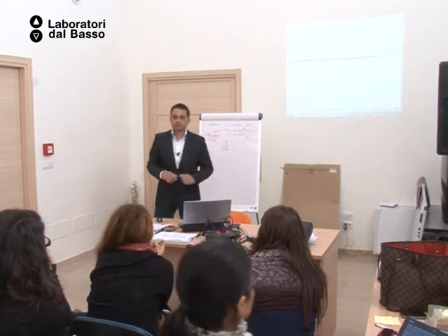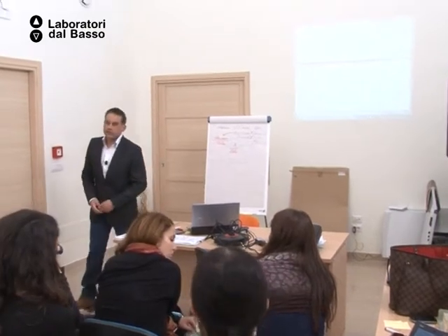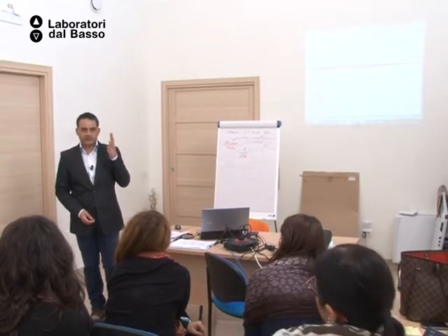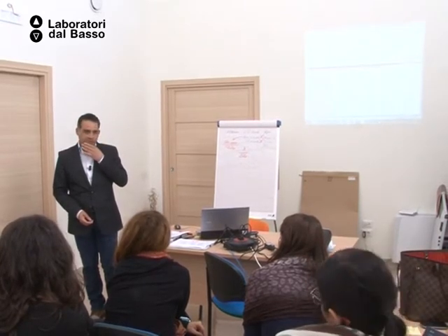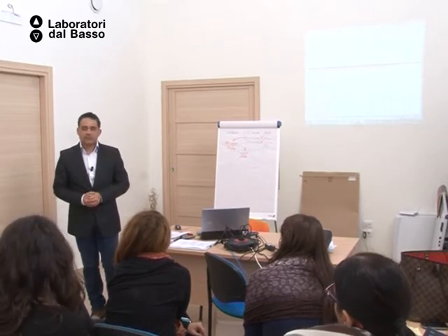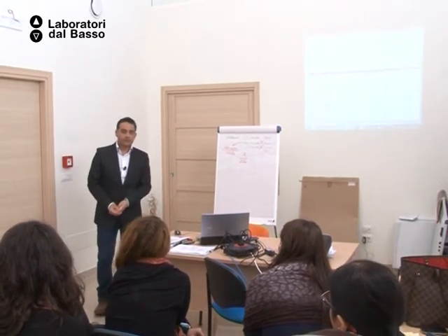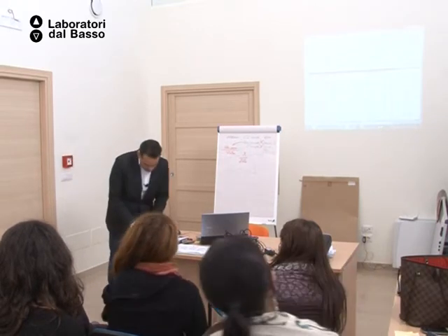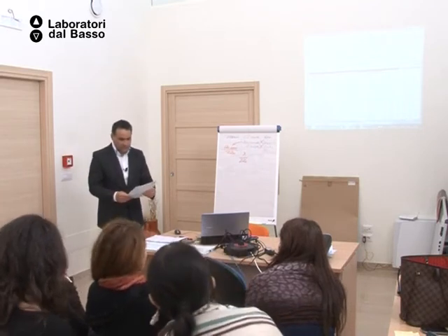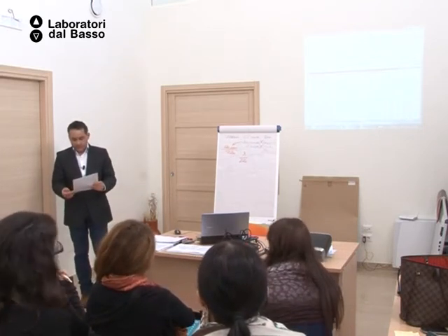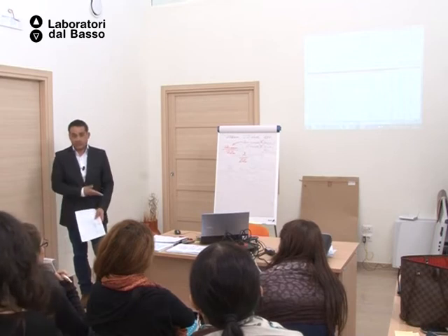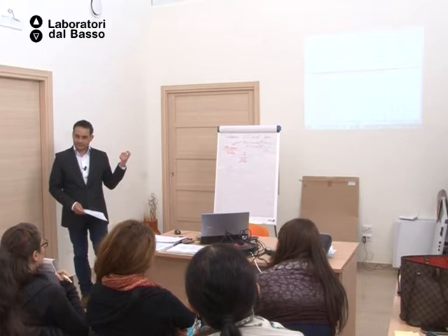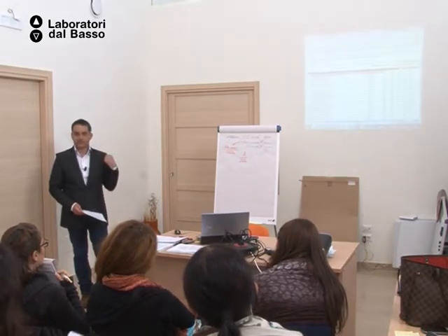No, you can change. Well, it's all about logic, you know. If you have four different persons during 2 years, you can have two persons at each trip. I mean, one person 4 days, two persons 8 days is possible, but you can have three people each time. You just apply. It will impact your budget. You will have less money for other things.